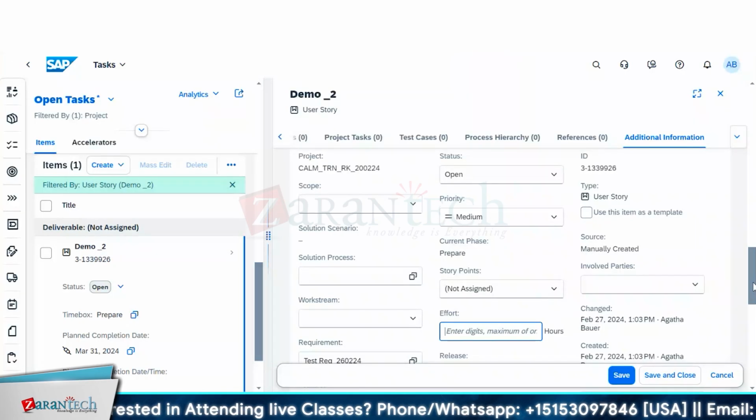In some projects, the user stories get assigned to the developer and then they give back how much effort is going to be required, right? In some projects, the team leads decide within the user story that this user story would require 72 hours or 8 days or whatever, right? So it happens both ways, right? Similarly, anything is fine, even in Cloud ALM, because everything is optional.